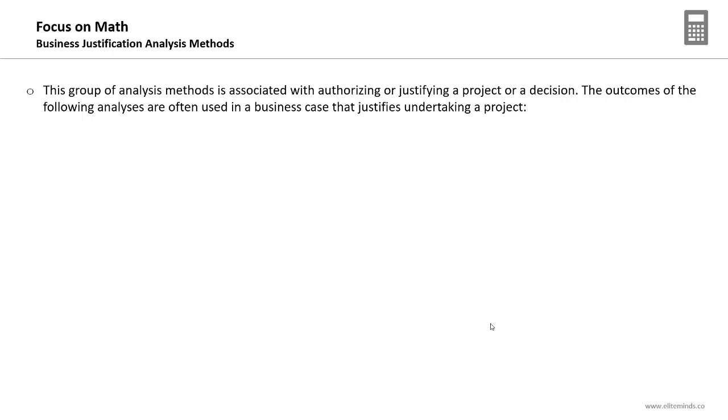Now, because the results of this analysis are recorded in the business case, the business justification analysis methods are not techniques a project manager should conduct. These activities are conducted before the project is kicked off, before even developing the project charter. It is at the pre-project phase, and it's usually conducted by the business analyst or the project sponsor team. Now, what are these methods?